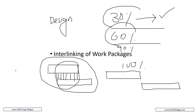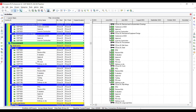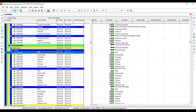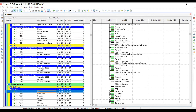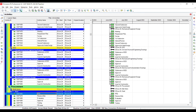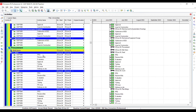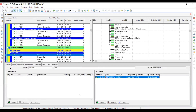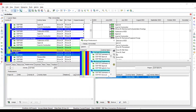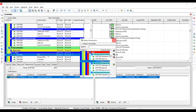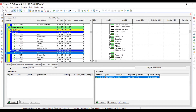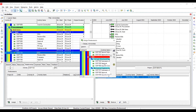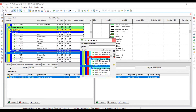Now in Primavera P6, for procurement: RFQ for bulk items — steel — is actually linked with our detail engineering design for civil, specifically 'issue for construction.' When issue for construction is done, I make the RFQ a successor. Assign: civil detail engineering design, issue for construction. Then procurement crush is also assigned the same activity for civil detail engineering design.